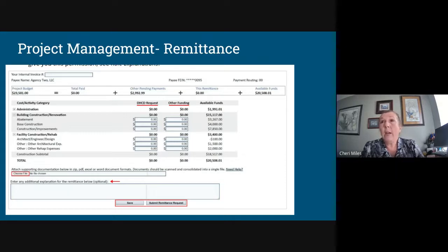If you are doing an ARS construction rehab, we need the contractor's contract that you're under contract with. We need the scope of work, and we need any inspections that are being performed on that project. So everyone is different, and I urge you, if you have a question, to reach out to your CD specialist, tell them you're getting ready to submit, and ask, have I covered everything? And I'm going to let Elizabeth and Kelly pop in, because I know that CDBG has different requirements, and sometimes you even have a cover sheet with those requirements.